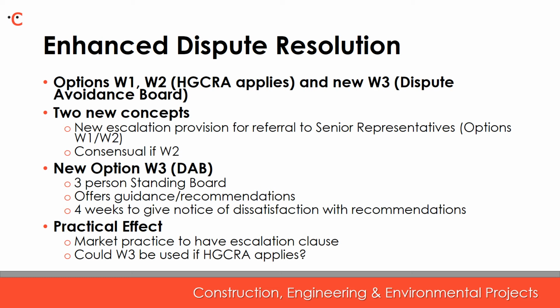Whilst W3, which provides for use of a Dispute Avoidance Board, is not intended for use when the Housing Grants Act applies, if the process was consensual, rather like the escalation wording in option W2, then it could equally possibly apply when adjudication is an option to the parties as well.